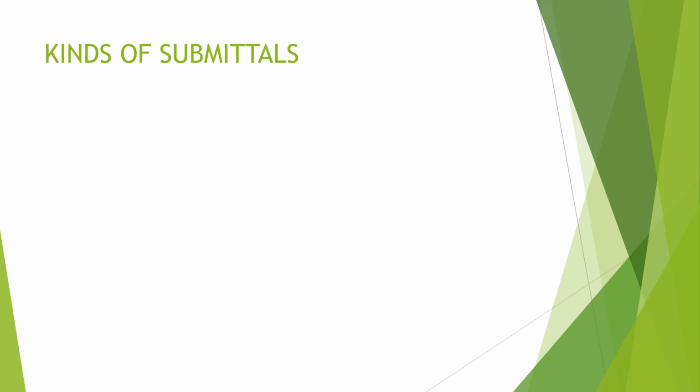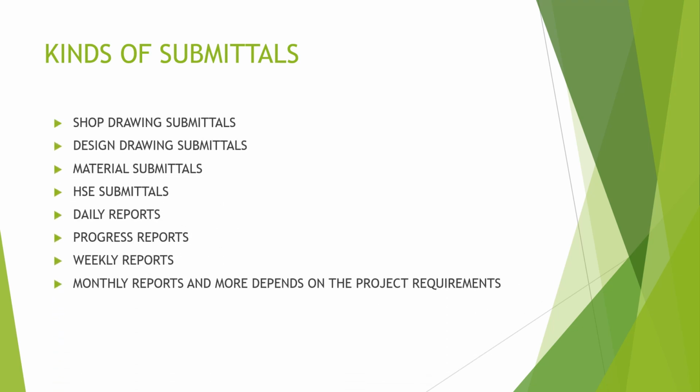Kinds of submittals: shop drawing submittals, design drawing submittals, material submittals, HSE submittals or health, safety, and environment submittals, daily reports, progress reports, weekly reports, monthly reports, and more, depending on the project requirements.